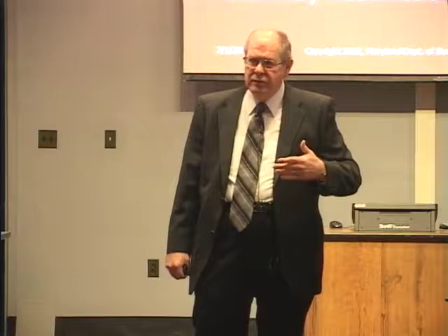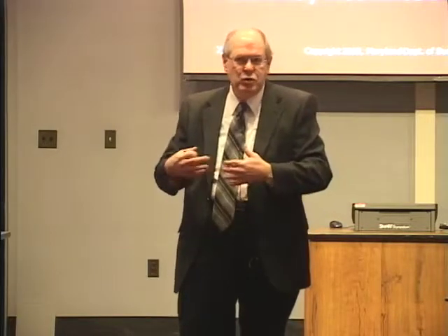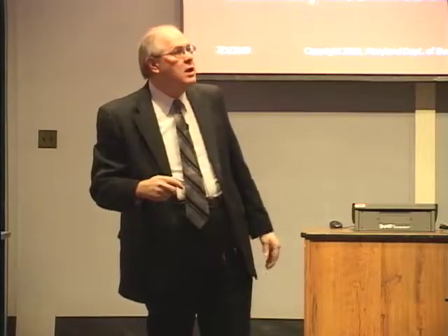because a bond should be there for the duration, except that, as we discussed in the bonding class, often it's difficult for vendors to get multi-year bonds. So one of the things that can be permitted is an annually renewable bond. And if that's the situation, then it can come to the point that the surety does not renew a bond for a company. And if that's the case, then we have the situation of what do you do now if it's renewable but it's not renewed. And we deal with that primarily in the bonding class, but that's an issue you must be aware of. And so it can happen for bonds and it happens for insurance.